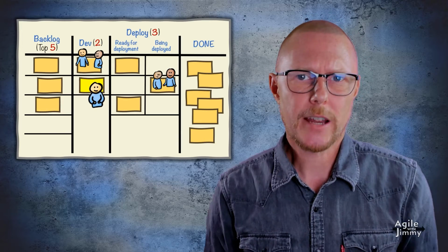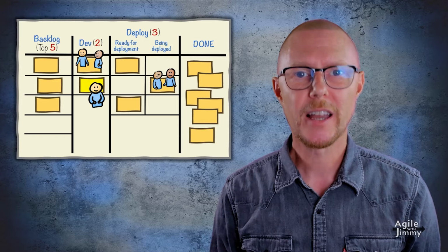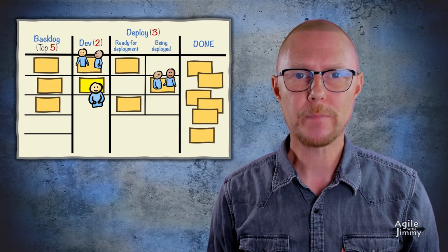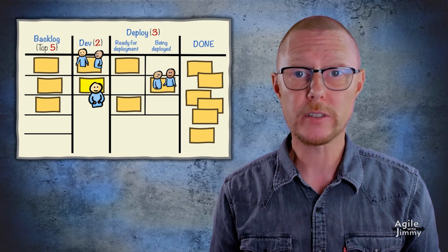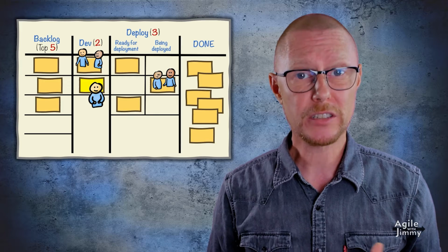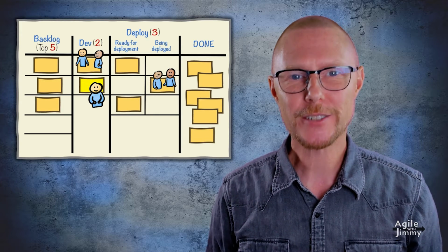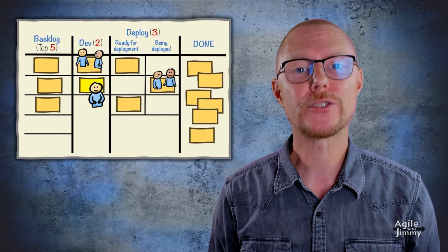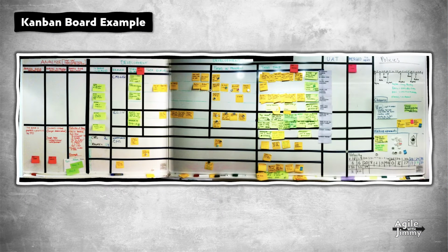Even though annoyed by our strict discipline on respecting our WIP limits, I do fully understand and value how it makes us so much faster as a team, how it reduces multitasking and prevents things from getting stuck. And it kind of forces us to collaborate more, which I love for so many reasons. Any process can be visualized as a Kanban board. Here is one really complex example. Once visualized, you impose WIP limits, which is going to reveal your bottlenecks. And from there, you start improving your process, tooling, and way of working together as a team.